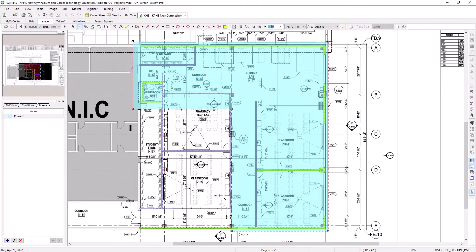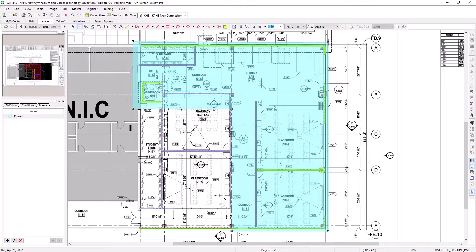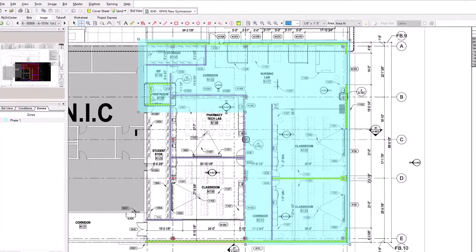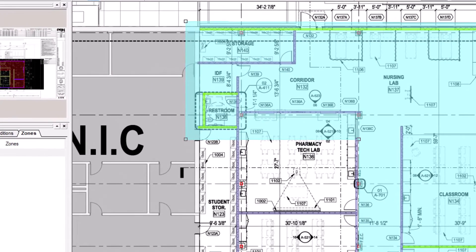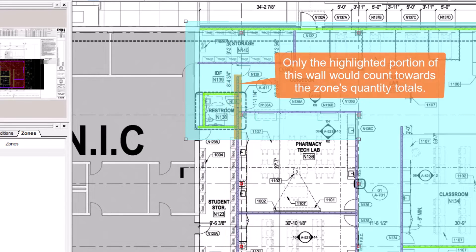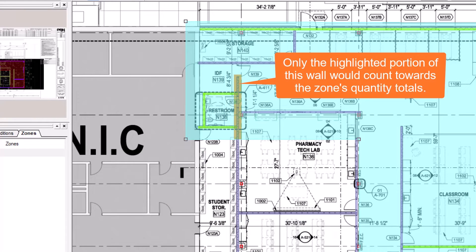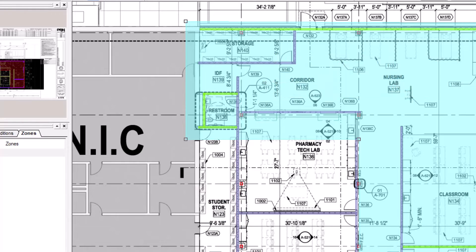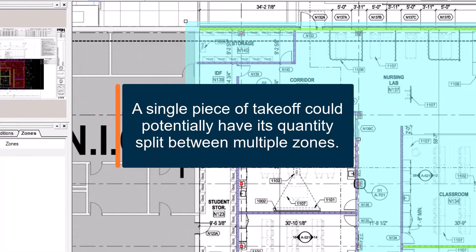Any takeoff inside the zone's area has its quantities added to the zone's totals. Another benefit to using zones is that if the zone's boundary intersects a piece of takeoff, only the portion of that takeoff that is inside the zone's boundaries counts towards the quantity totals for the zone. A single piece of takeoff could potentially have portions of its quantity assigned to multiple zones.